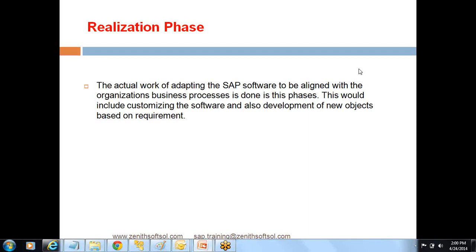Then we need to also focus on ensure that the SI staffing model for realization phase matches with the work effort in estimations. Like SAP system configuration, RICEF development and testing work efforts is estimated by the SI followed by your approval at the end of blueprint. So manager PMO has to approve. Without the approval, your functional consultant cannot start doing customizing. So you have to make sure that the number of resources in each team matches with the effort required to complete the deliverables as per the RICEF estimates. So other teams such as PMO, basis team, OCM and training are duration based, and staffing of these work streams should match with the estimates provided by the SI at the start of the project.